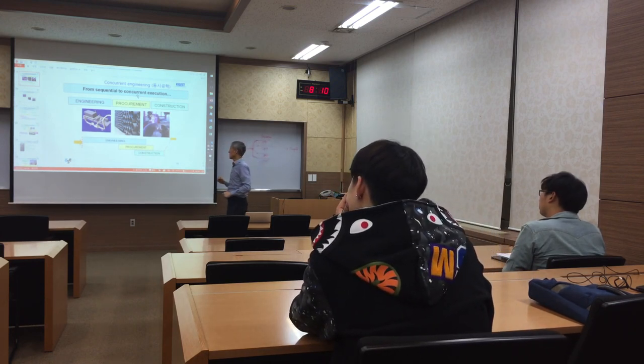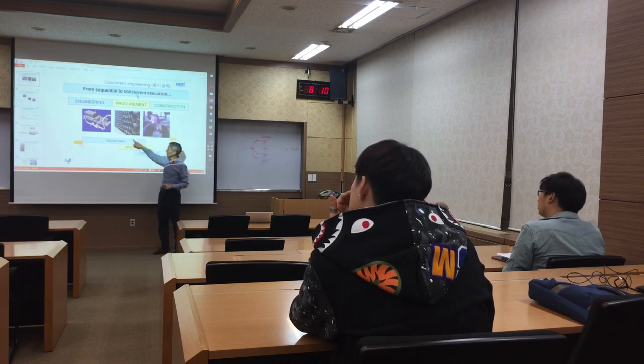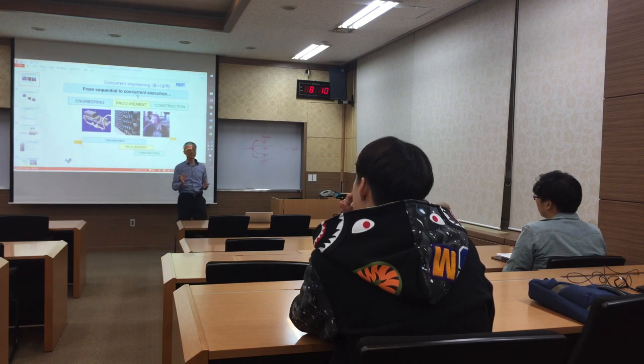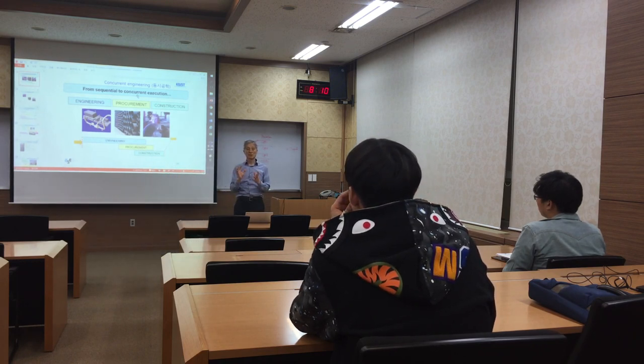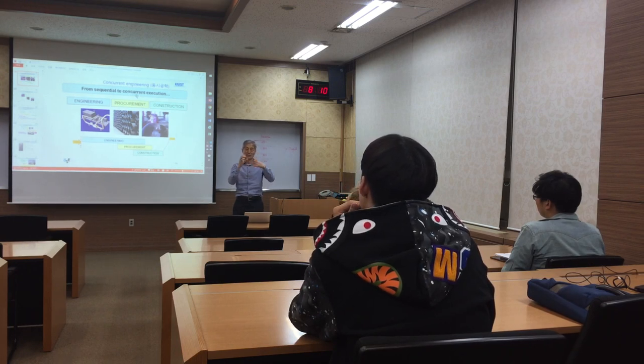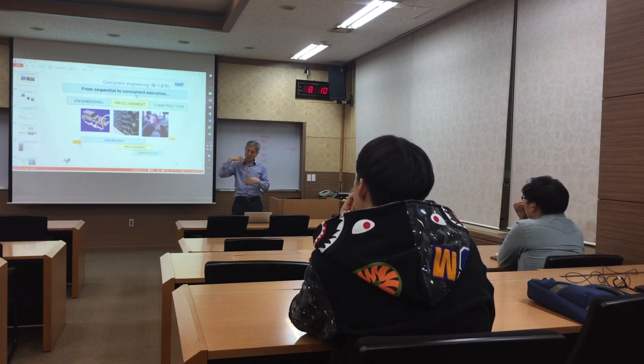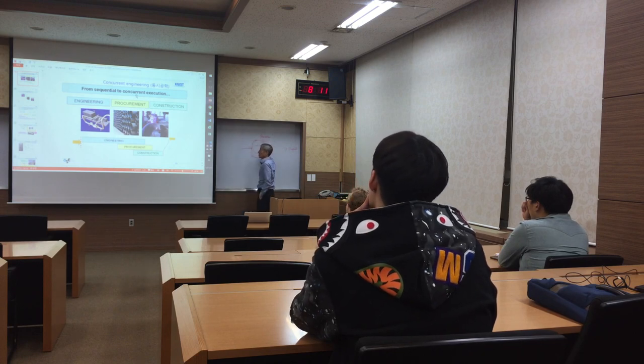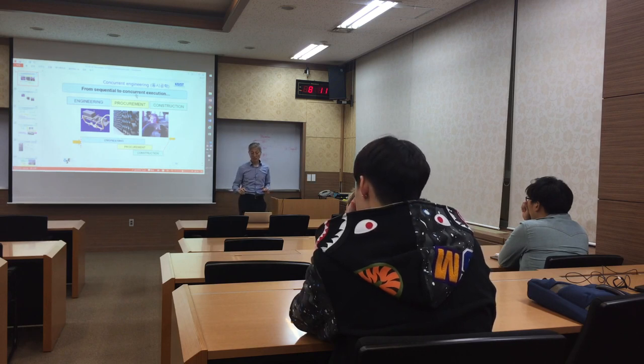And then what happened? If they change something in the design toward the end of the schedule, but equipment is already ordered, a mismatch can happen. So communication is more important than before. Frequent communication: if there are small changes, immediate release of information. Information sharing is important. In that case, you need to have a common database among all members of the company.